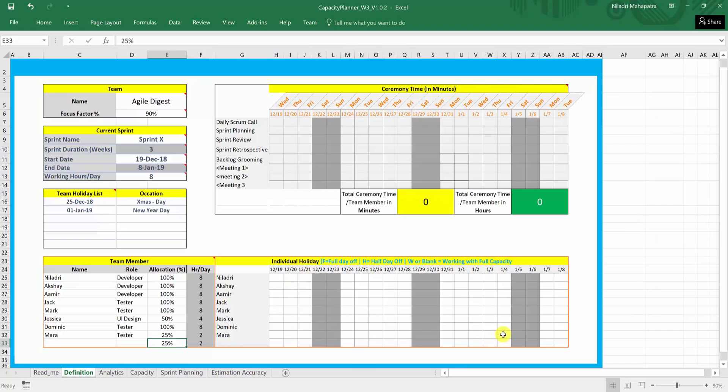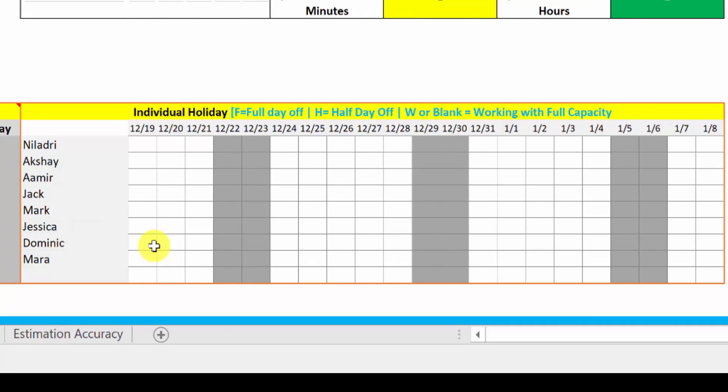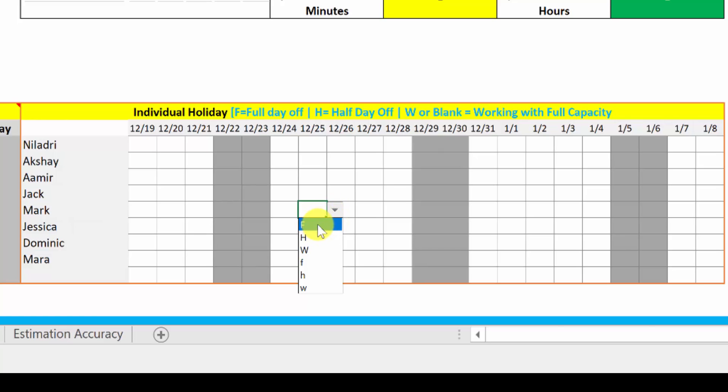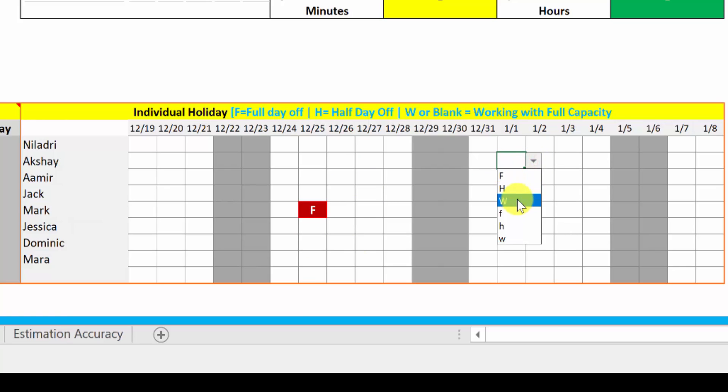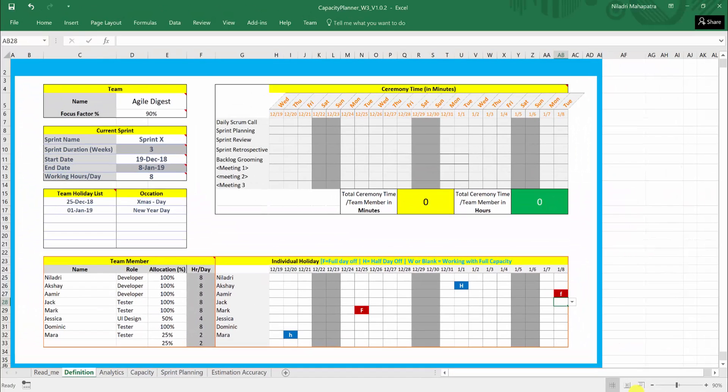Now this section is talk about if anyone have a planned half day off or full day off that you can define here. So if you make it type W here or keep it blank it means a full working day. If you mark F or full off, it will be show you as a red. If you show someone as H, you can actually type in also. So I am saying these are the person who will be half day off and these are the person who will be full day off. So this is what I have defined who will be taking off on what day. Based on that, it will be taking the vacations.